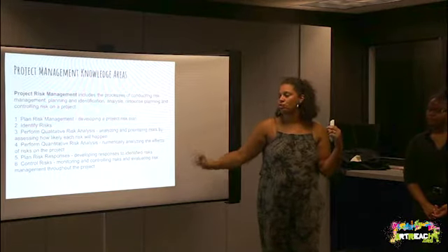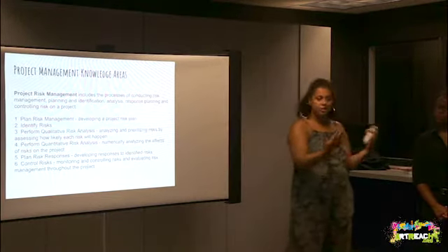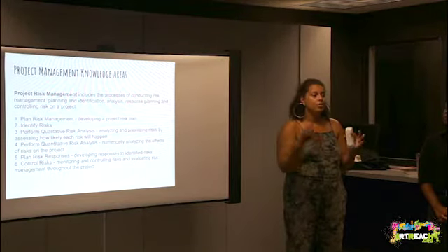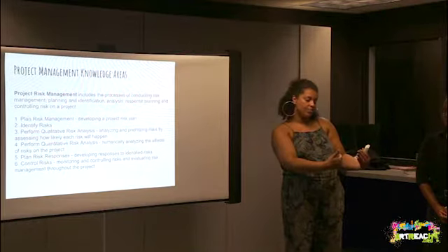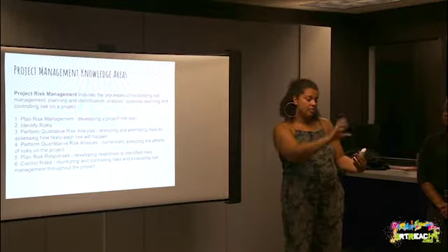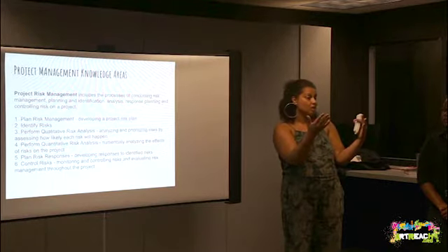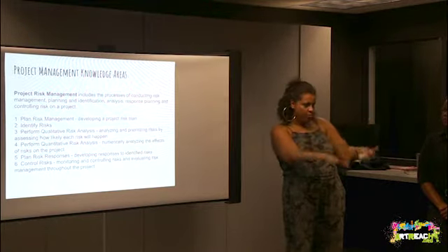And then you're going to control your risks. All throughout your project, similar to evaluation or anything else, you're going to keep looking. Is this going to happen? You look down the risk list. This was in this part of our project. It said that this might likely happen. Are we still thinking that's a risk that's going to happen? If not, it moves down the list.